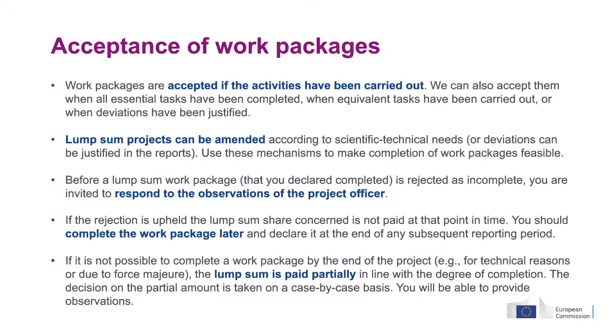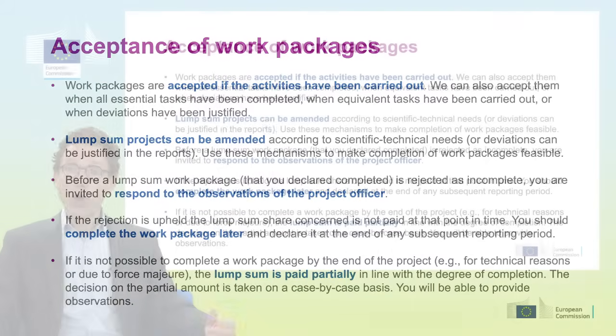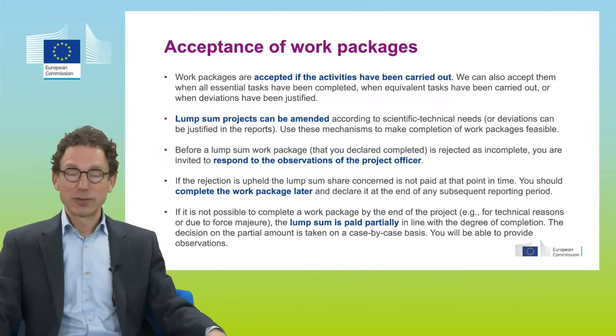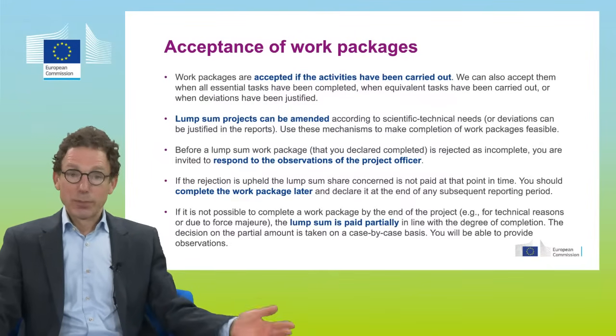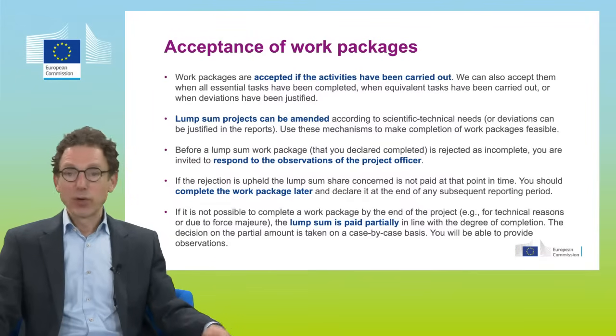Of course, you can equally use an amendment procedure. Just be sure to start that early enough before you report and before you come to the end of a reporting period, because otherwise the amendment process and your reporting and payment process, they interfere.